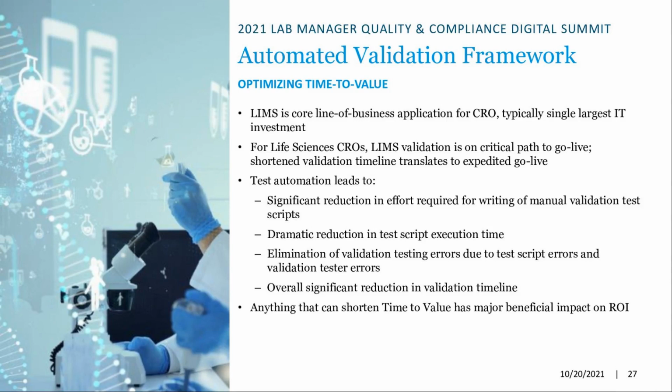And as I said, anything that can shorten the time to value has a major beneficial impact on ROI. We did an implementation of a system at SGS, and we ended up running into delays, and our whole ROI model was built on a certain go live time when we would start getting benefit from the system, and its cost savings, which is how we justified the investment in the system.